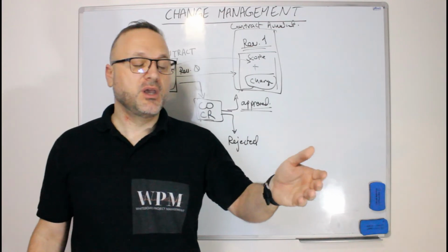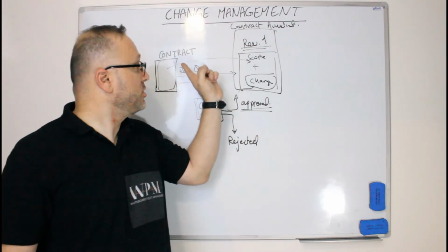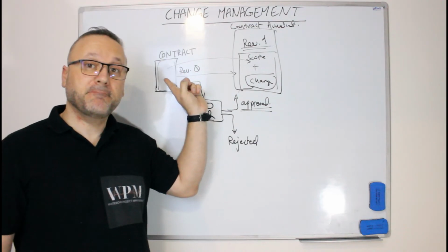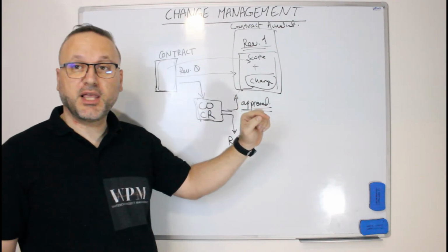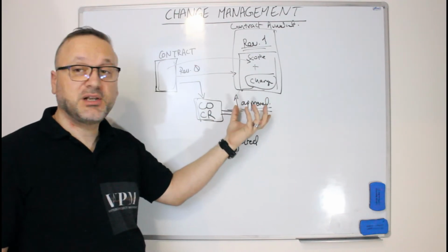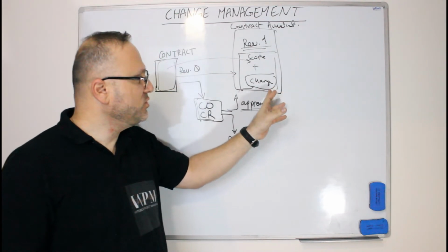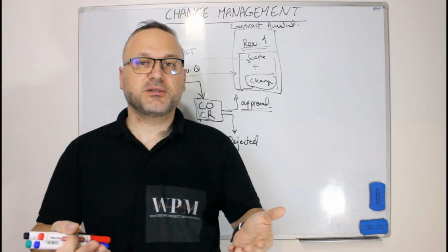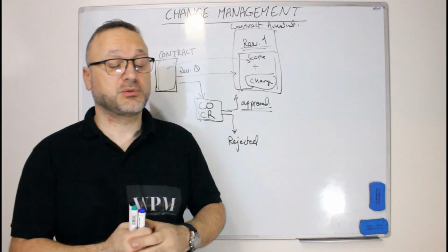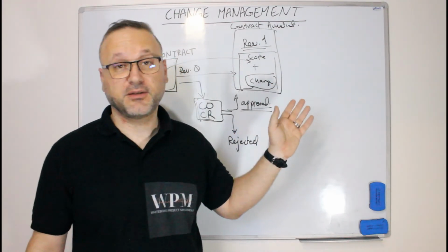You could have some cash flow based on your contract milestones, but now you changed it, you added some deliverables to the project, and those deliverables have new payment milestones. The new payment milestones will be added to the old milestones. So that means the cash flow of the project is now completely different.